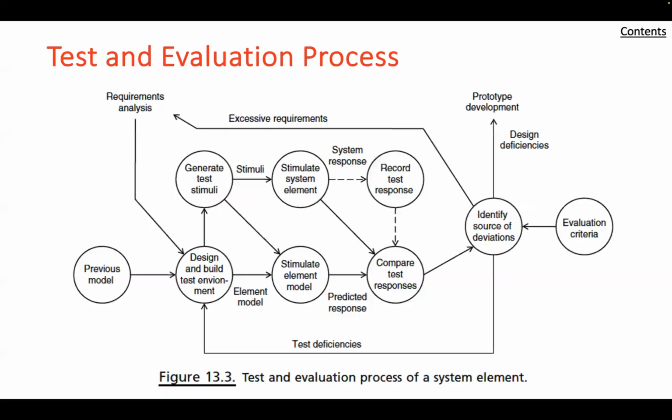Well, we've mentioned a couple master plans, a systems engineering master plan, the SEMP. Well, now there's something called the TEMP, the Test and Evaluation Master Plan. And so it can be a formal requirement, say if this is a government-related type of effort that you're doing. So the TEMP is a plan to first be prepared as part of a concept definition and expanded and detailed at each phase of the development.